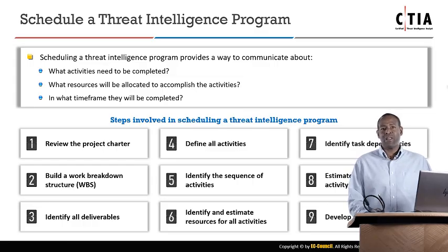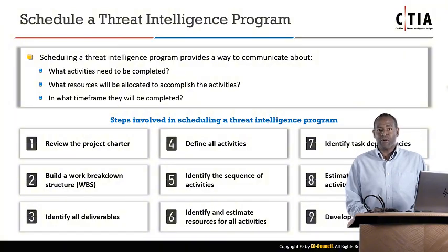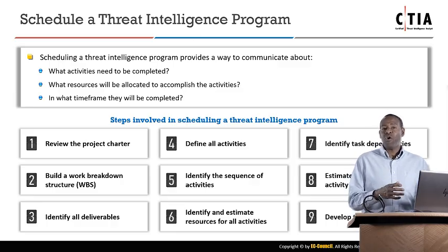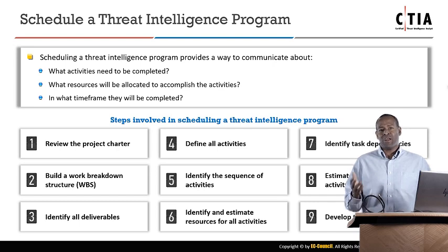Well, in 2 weeks, I realized that not only did I have to work with zoning, not only did I have to design and manufacture, but I had to get those designs approved before manufacture by corporate headquarters, who turns out they already had their own designs that needed to be tweaked for our specific building. It goes on and on.